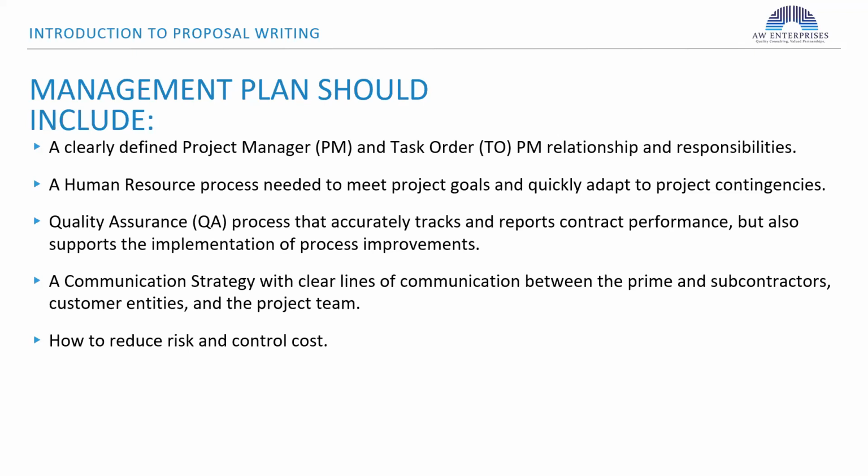On time and material type contracts, where they get paid by the hour instead of the firm fixed price, it's more flexible for the government because it's easier for the contractor to come back and say, we're running out of money, we need some more funding. That's true of every contract, even firm fixed price, but it's more important in the time and material area. If something comes up that needs to be adjusted and the government can provide that extra funding, they need to be alerted. It should be managed by the project manager on a monthly basis.